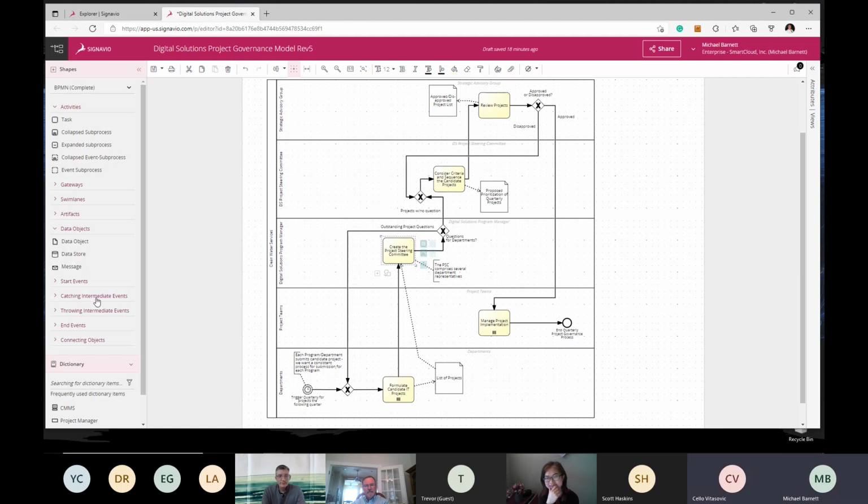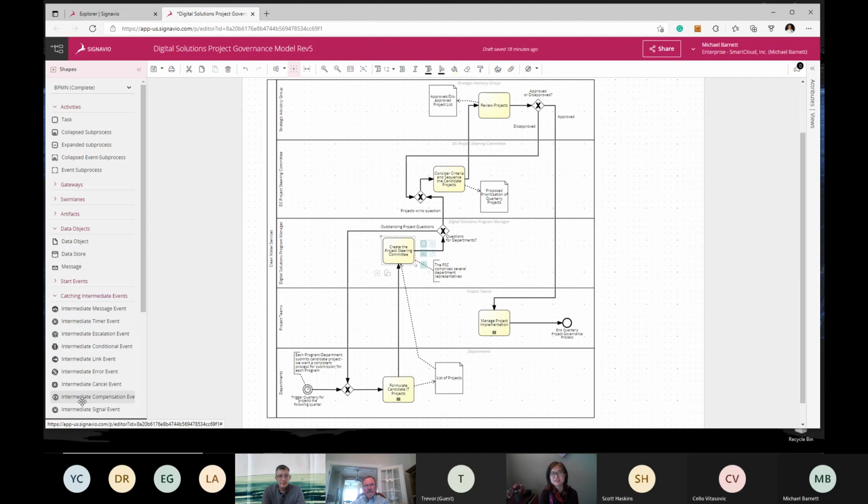So the schedule would be, let's say around the beginning of March, everyone should start submitting their project list. And then ideally, once we get this into a routine, by the end of March the committee meets and then starts to plan for the next quarter's activities. So there's a kind of queue here that builds up, and then a call to order or something like that.